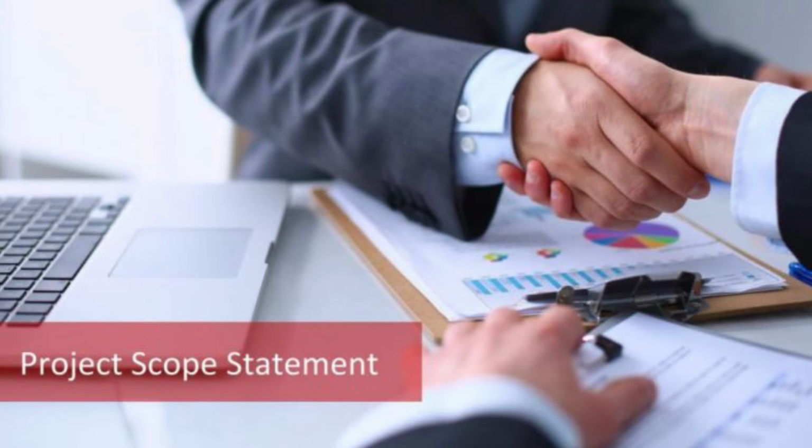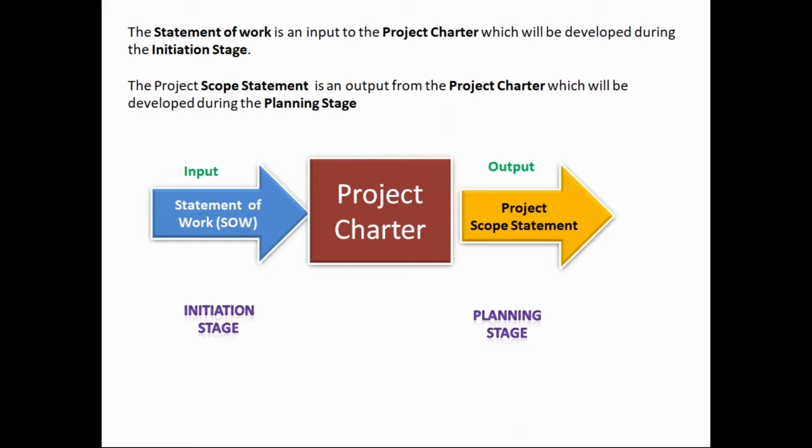In this slide, you can analyze when exactly the statement of work and the project scope statement will be prepared. The statement of work is an input to the project charter, which will be developed during the initiation stage. The project scope statement is an output from the project charter, which will be developed during the planning stage.